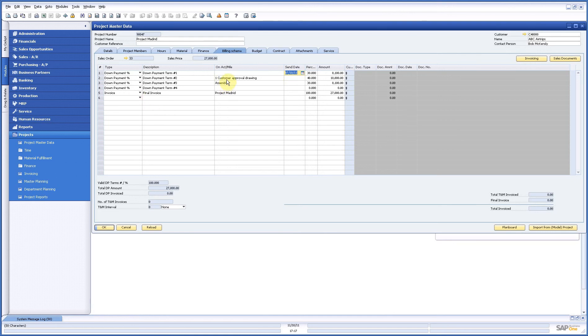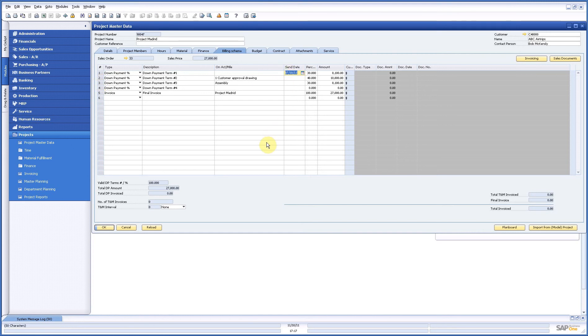If I link it here on milestones and activities, as soon as they are finished the invoice will be put ready and can be printed. In this case we just do it based on a date.